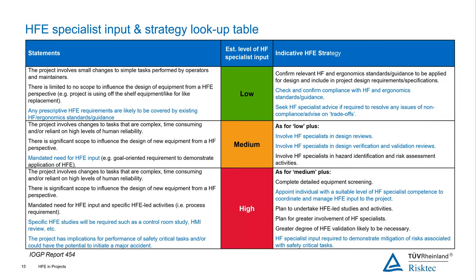And so this is an extract from a lookup table, which helps you think about the level of specialist input you need. And when I say specialist input, I mean someone that's an ergonomist or a human factors specialist that's qualified in that. So what you'll see here is we have a number of statements. And I'm not going to read them all out, but you can see that for each statement, you look at the statement and it gives you an indicative level of input that you may need and an indicative strategy. So if we look at the first box at the top, pick out the text in blue, the statement is: any prescriptive HFE requirements are likely to be covered by existing human factors ergonomic standards or guidance.